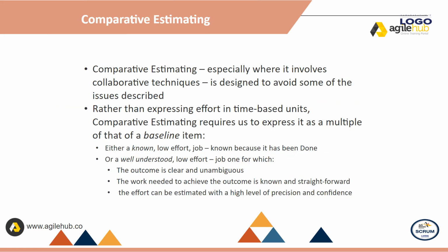Comparative estimating. Comparative estimating, especially where it involves collaborative techniques, is designed to avoid some of the issues described. Rather than expressing effort in time-based units, comparative estimating requires us to express it as a multiple of that of a baseline item. Either a known, low-effort job, known because it has been done, or a well-understood, low-effort job, one for which the outcome is clear and unambiguous. The work needed to achieve the outcome is known and straightforward. The effort can be estimated with a high level of precision and confidence.